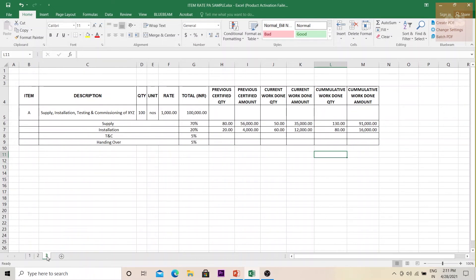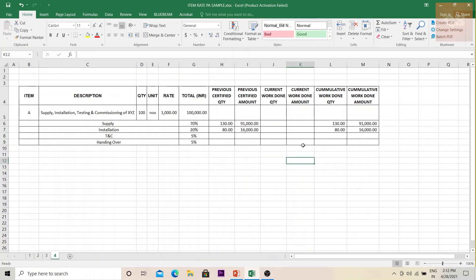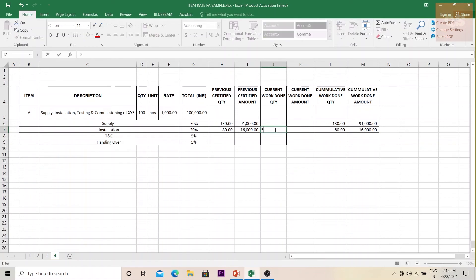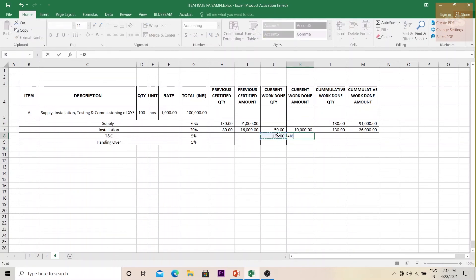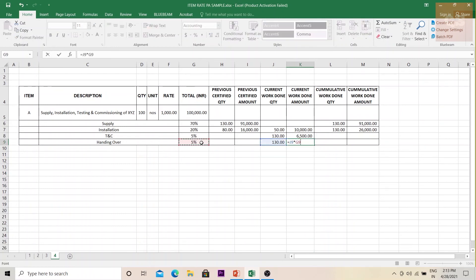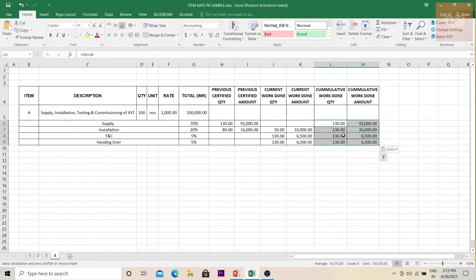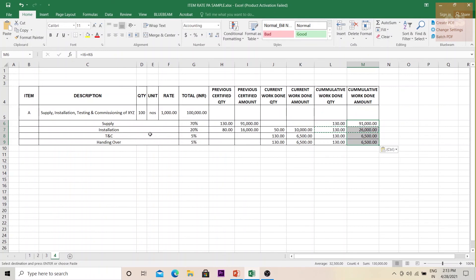For the final invoice, we copy cumulative to previous and clear current. The total quantity for this item is 130. The remaining 50 are now installed. The entire work has been completed, so we claim testing and commissioning: 130 × 5% × the rate, and handing over: 130 × 5% × the rate. In spite of the BOQ being 100 numbers, the actual total is 130, and payment is claimed across all stages — supply, installation, testing and commissioning, and handover.